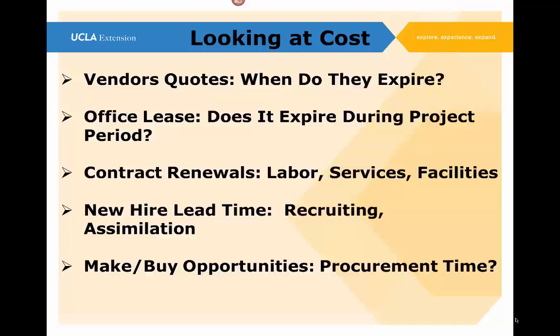And then when we look at procurement time, if we want to arrange something like that, we want to get a temporary labor agency. What's the processing time? What's the process inside our company for getting a procurement through to put a contract in place? How long would it take before we have that individual on board reporting to the project? How long might it take? And not only how long might it take, what kind of complications could we run into?